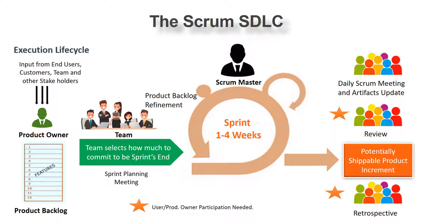So, we have the sprint planning ceremony, which is 2 hours per 1 week of sprint. So if you're going for a 2 weeks sprint, you would have a maximum of 4 hours to complete your sprint planning in. Similarly, when it comes to daily scrum, it is 15 minutes per day. Only the development team is supposed to speak. Product owner is optional, but as a personal suggestion, the product owner should be called on this call.